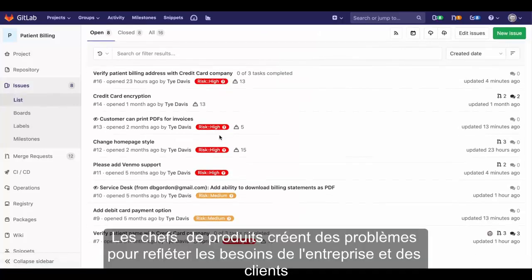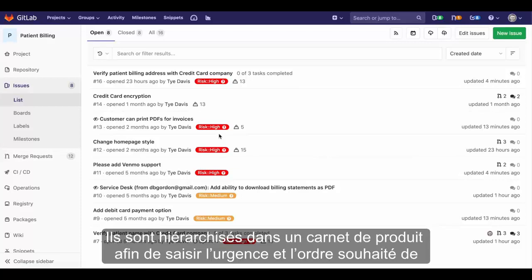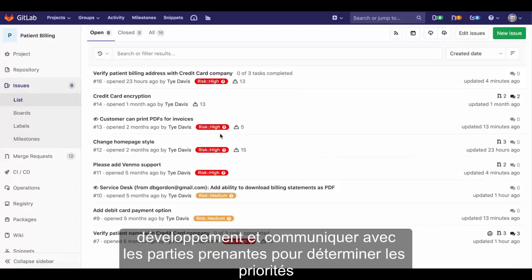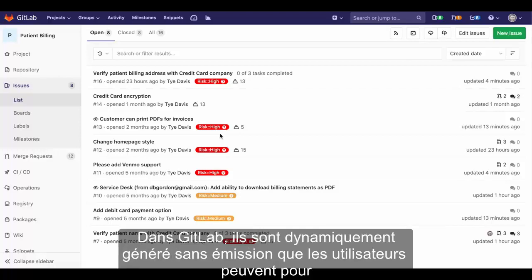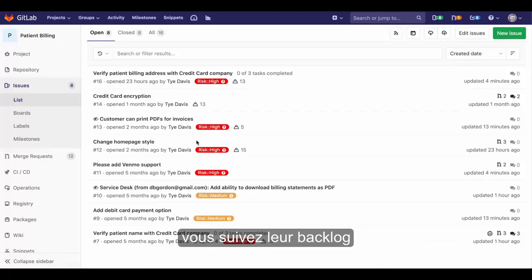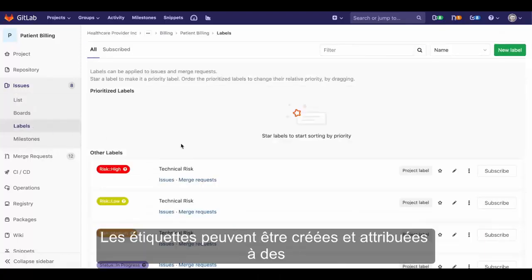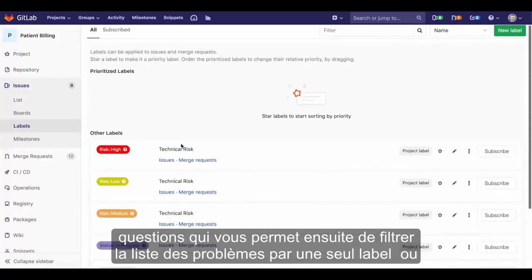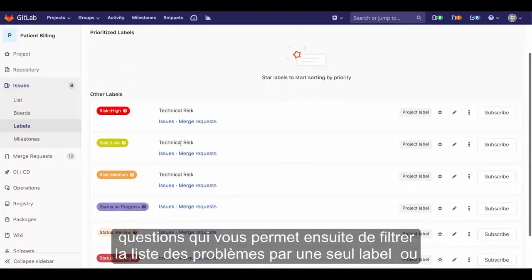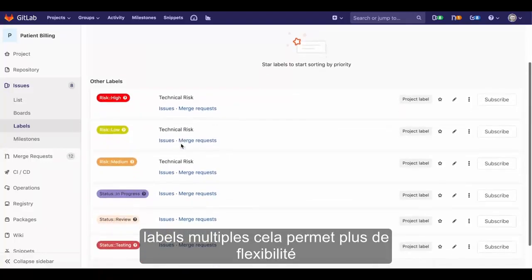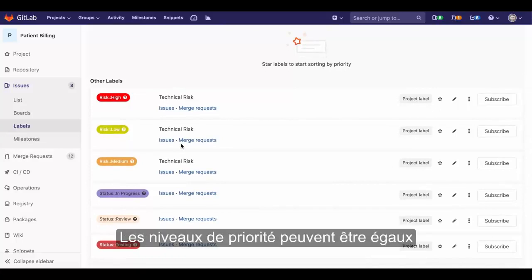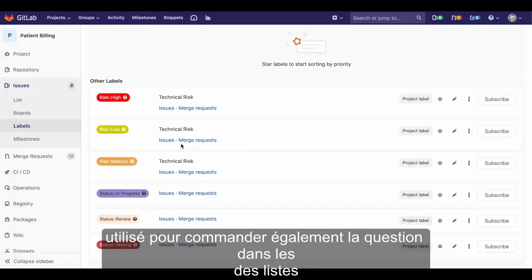Product owners create issues to reflect the needs of the business and customers. They are prioritized in a product backlog to capture urgency and desired order of development, and communicate with stakeholders to determine the priorities. In GitLab, they are a dynamically generated issue list which users can view to track their backlog. Labels can be created and assigned to individual issues, which allows you to filter the issue list by a single label or multiple labels, providing further flexibility. Priority labels can even be used to order issues in those lists.